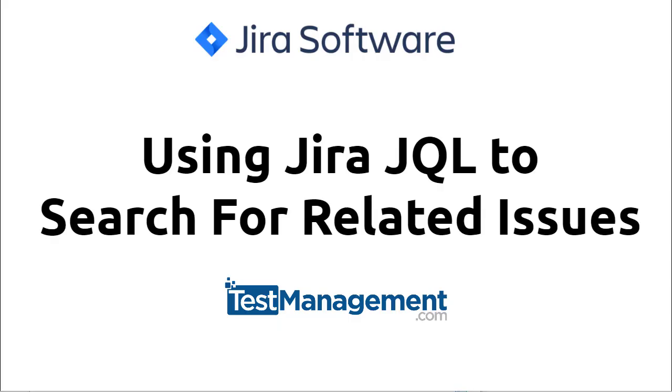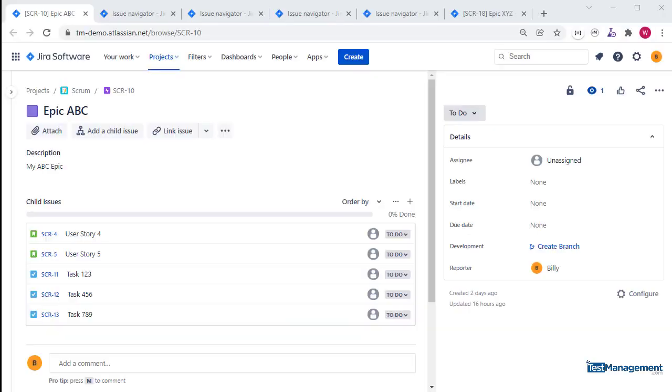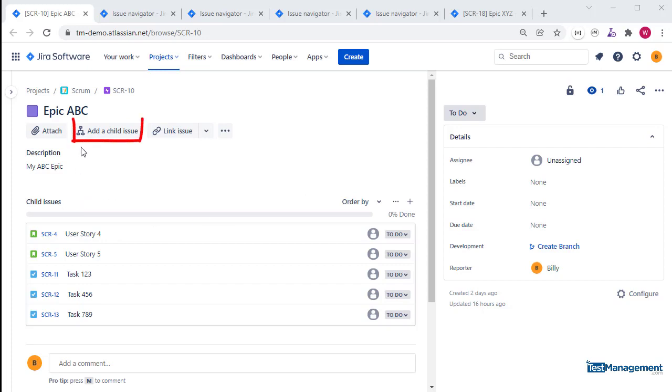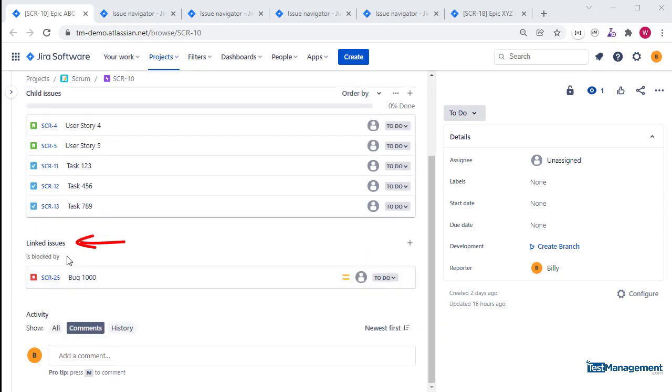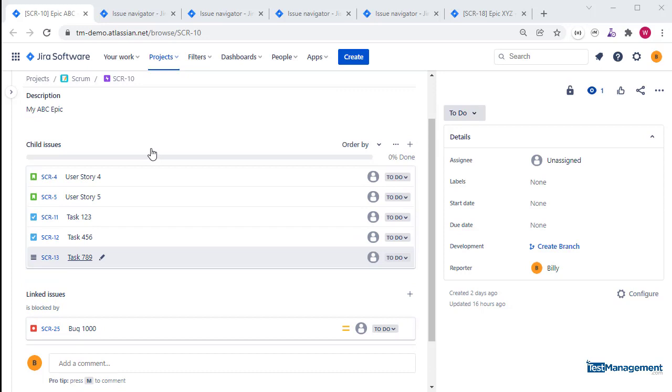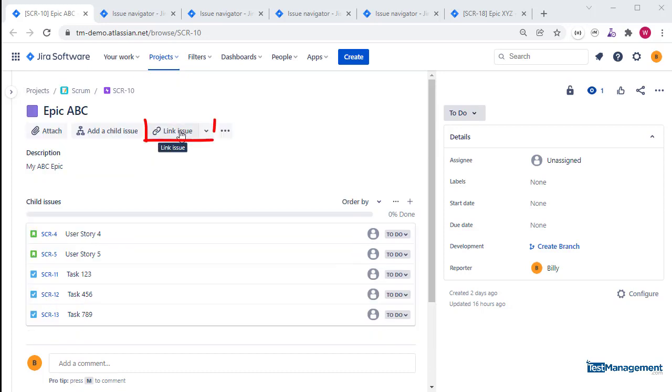Using Jira JQL to search for related issues. In Jira, there are two ways to relate issues to each other: first, the parent-child relationship created with the add child issue feature; second, linked issues created with the link issue feature.